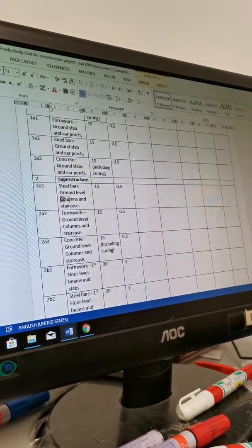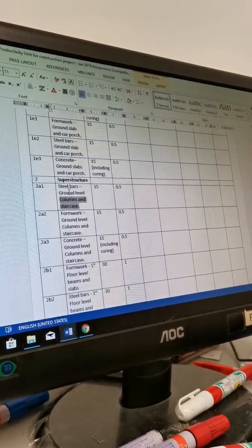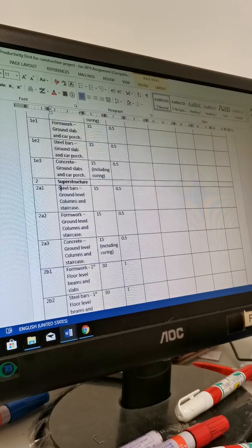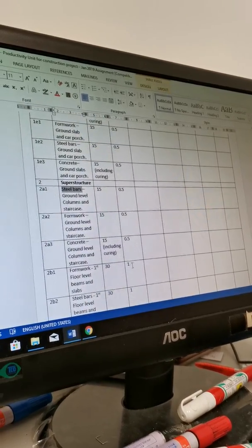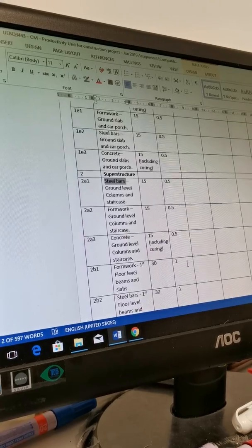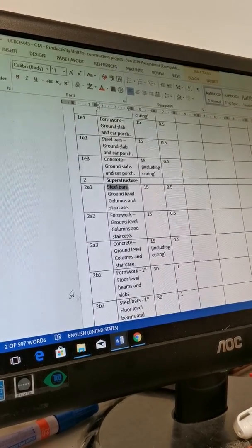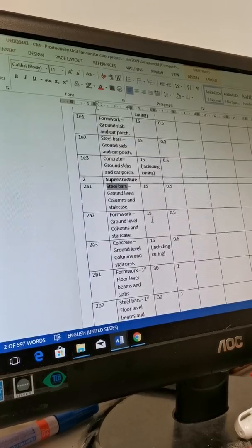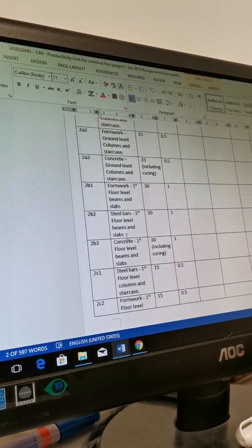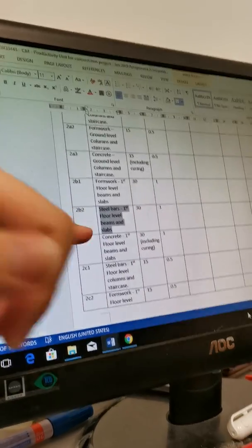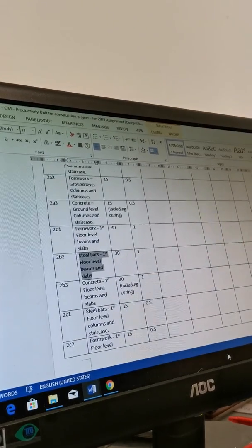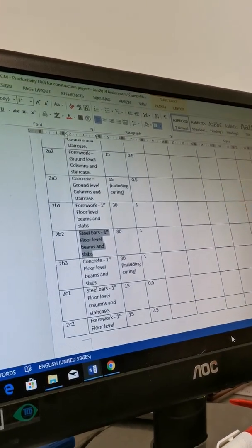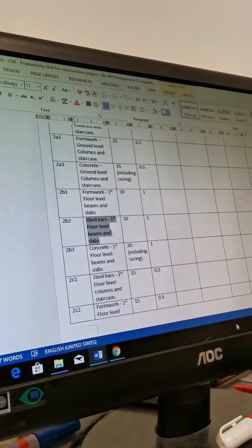You can see why this one is the starting one. Okay. You see this one? I didn't put formwork. Other time is formwork starting one or not, but this one column must be the steel start. Steel start. You don't put formwork start, then how to put in your steel? Are you clear? You must put your steel already, then you need your column come, then you pour concrete. Clear? Then this construction method by this group here will be the slab and the beam at one go. See here? If one go, the quantity you combine now. So, if you want to follow this one, you combine. If no, you break it. Clear? Okay. So it's all towards a combination of your quantity only.